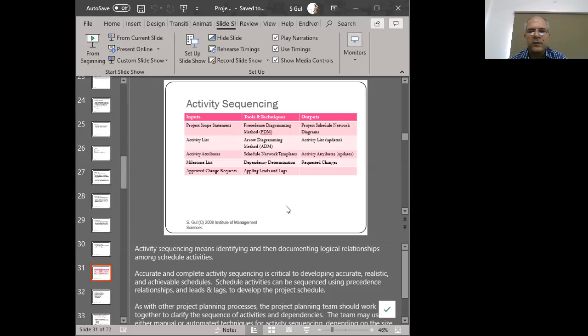We've talked about this a lot. We've got the precedence diagram method, or we've got the arrow diagram. Now, regardless of which diagramming method that we use, we're going to come up with the same answer, which is that we're going to find out the critical path duration, and we're going to be able to identify our critical path, and we will also identify our float times that are available, the free time available, or the additional time that is available on an activity. So one of these two techniques, the PDM or ADM, can be used to sequence the activities. But in order to sequence these activities, we must know the predecessors of each activity. And in order to find the critical path duration, we must know the duration of each individual activity and its predecessors.